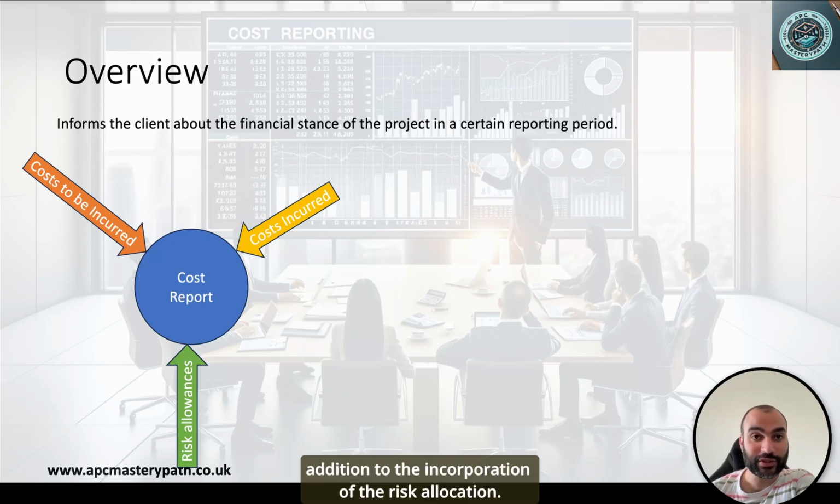The RICS would expect a QS to know how they can incorporate risk events within a cost report. And one of the easiest ways to do that is using the New Rules of Measurement 1, NRM1, which is devised by the RICS. In section 13, there are 4 main types of risks: the design development risks, construction related risks, the employer risks, and employer other risks. We would expand further on NRM1 and the different sections of NRM1 in the quantification and costing of construction works lecture.